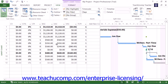You will also see the Budget at Completion, or BAC, which is the total baseline cost for the task; the Estimate at Completion, or EAC, which represents the forecasted cost to complete a task; the Variance at Completion, or VAC, which is the difference between the BAC and the EAC; and the To Complete Performance Index, or TCPI, which shows the ratio of work remaining to the budget remaining as of the status date.